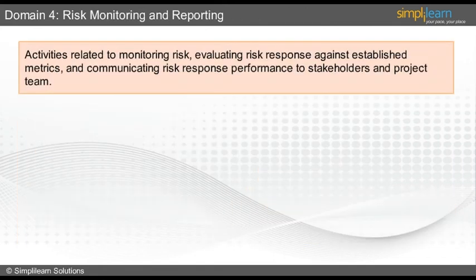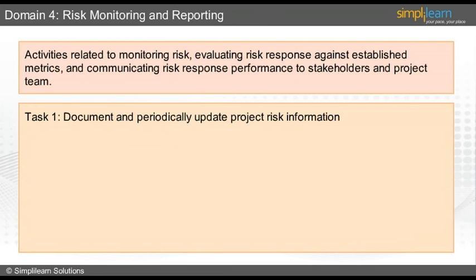Risk monitoring and reporting are activities related to monitoring risk, evaluating risk response against established metrics, and communicating risk response performance to stakeholders and project team. The first task is to document and periodically update project risk information to maintain a single source of information. The second task is to coordinate with project manager using communication to integrate risk management throughout the project.